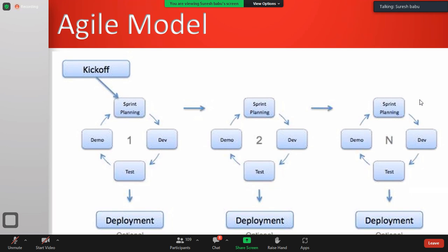I'm the domain expert. A total of 200 requirements are to be implemented, and in 1 week I explained all 200 requirements to you. Will you be able to remember? Definitely people will make many mistakes. Instead of that, let us plan only 2-3 requirements for a 1-week schedule and give a KT about only those 2-3 requirements. A senior person will explain that by this Friday, in this week, we have to develop these 3-4 functionalities. Give the KT about only 4 requirements to the team members.